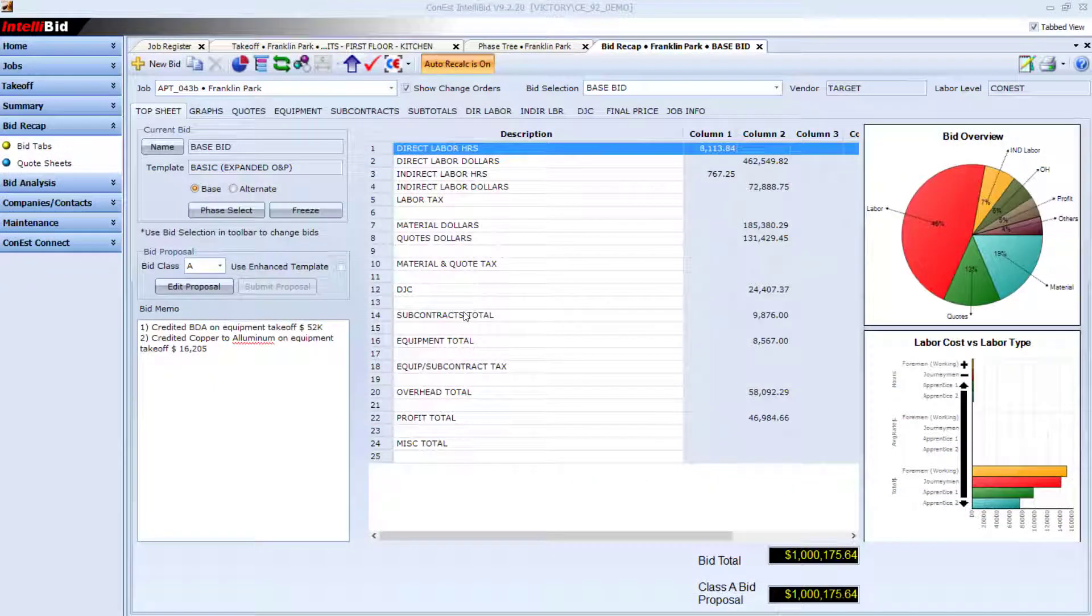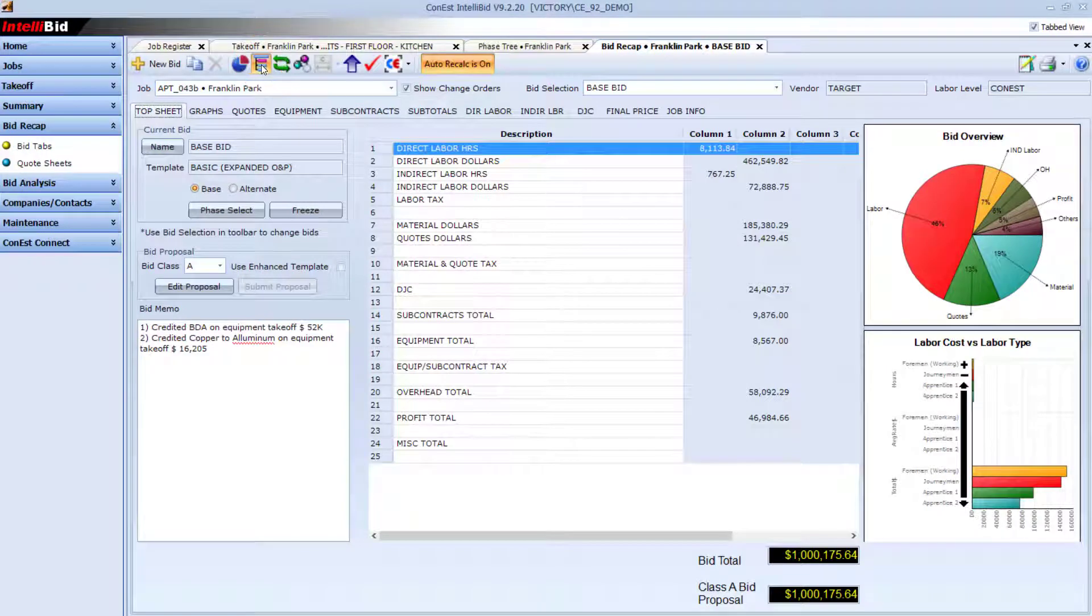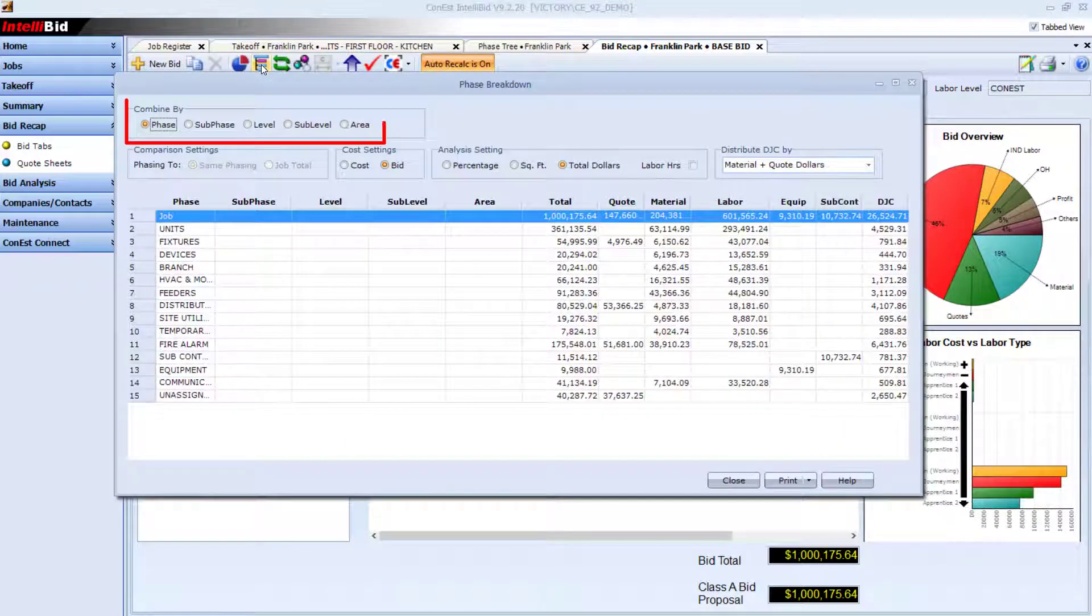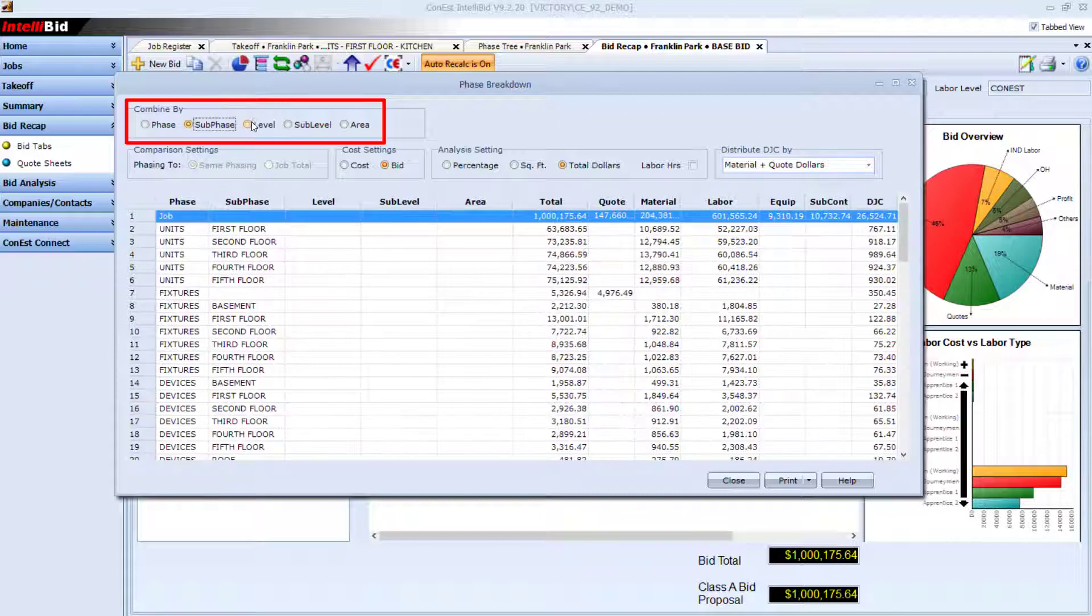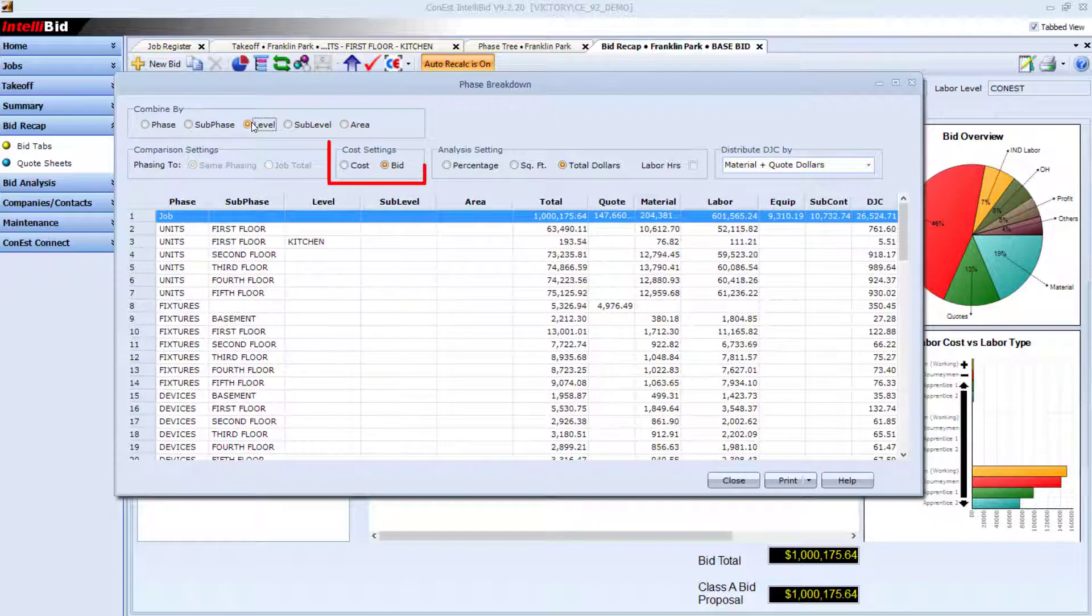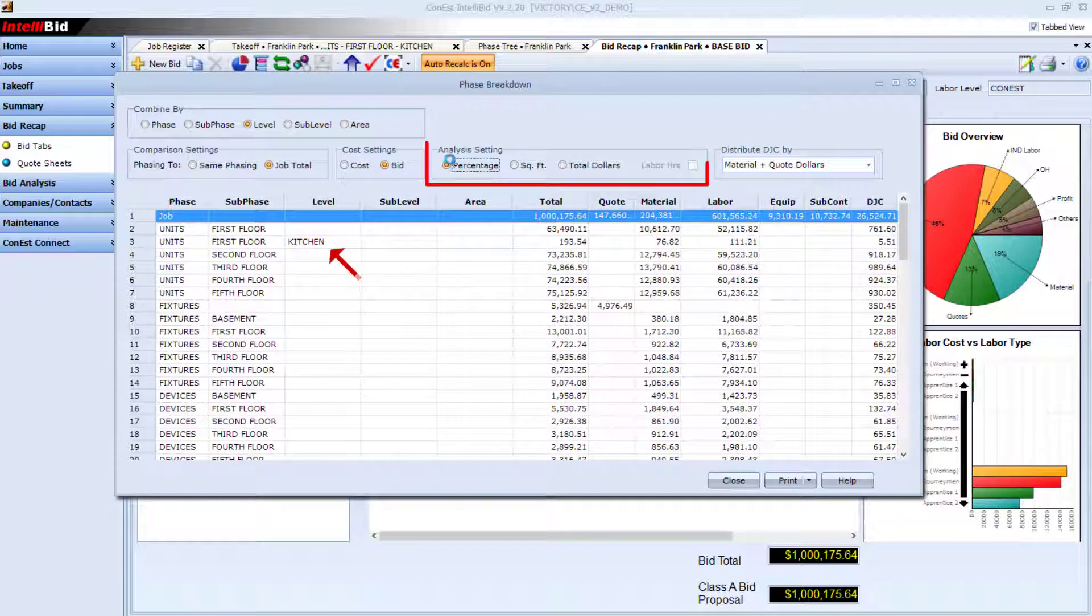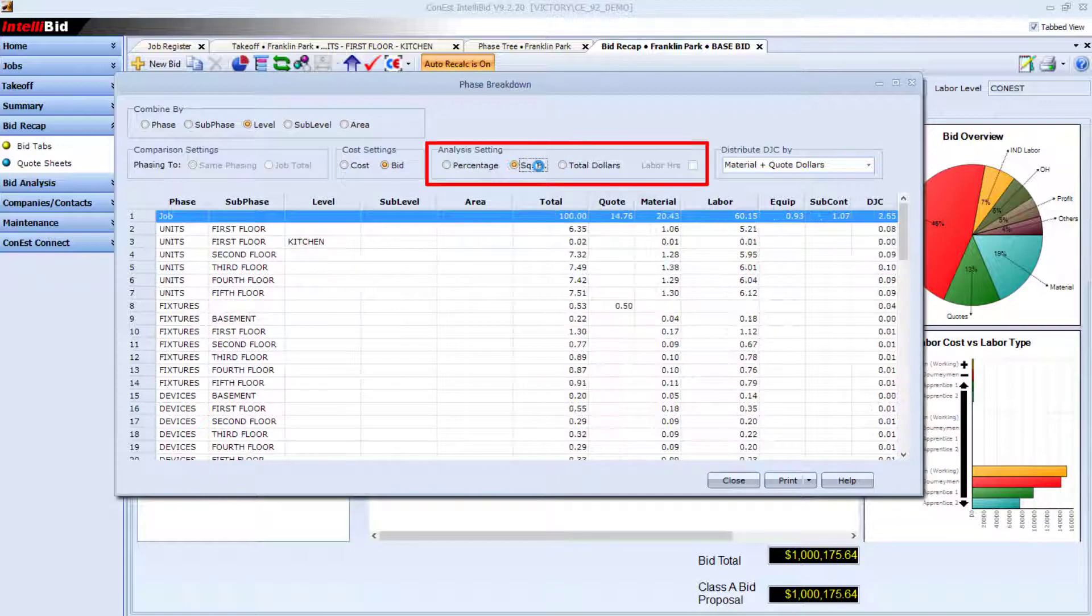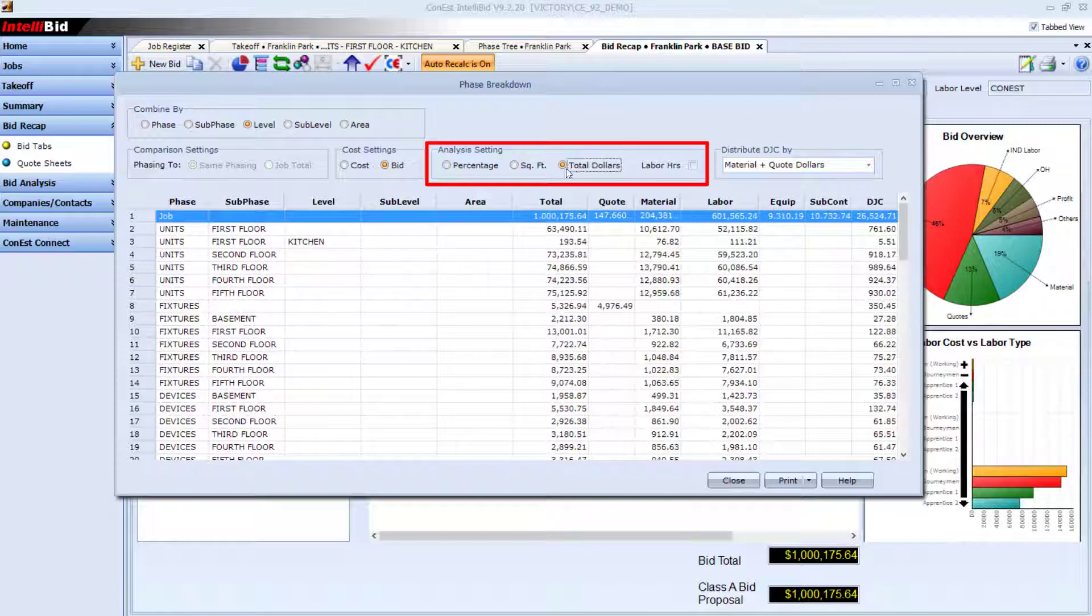Once you've completed your takeoff, you can use the phase breakdown in Bid Recap to analyze your bid. See your bid broken down by top-level phases or five levels deep of sub-phases. Break it down by bid price or cost, and even compare by percentage of job, square feet, or labor hours.